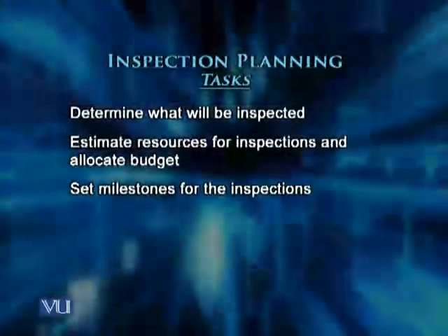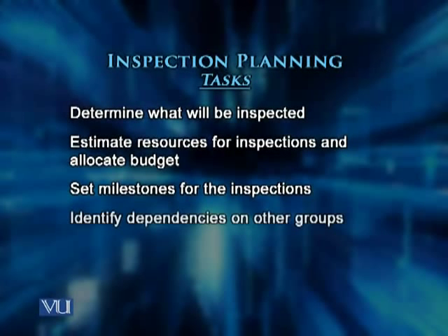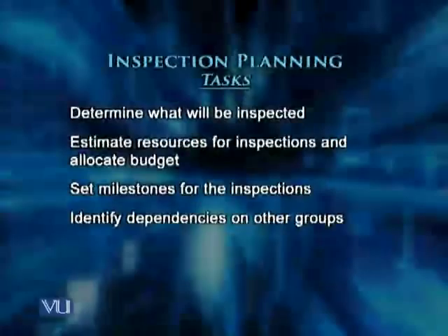We need to set timeline milestones for inspections, and we need to identify dependencies on other groups. This is very important if the software is part of a multi-group effort, or if the software is part of a system engineering activity in which hardware has to be developed first and then software can be developed. If hardware is not ready, software cannot be developed and tested. So these are the tasks for inspection planning.